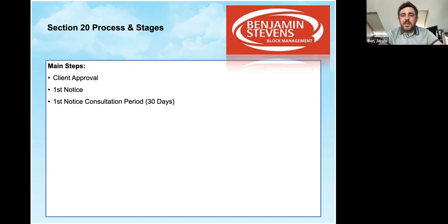So we don't feel at this time that if we extend it by a week on each notice period, you're then extending it by a couple of weeks, and you're starting to lose sight of the process. So upon ending of the consultation period, this is really where you should start to get tenders. And I know with certain projects, you might want to get an initial flavour of what something might cost for the client, which then starts the conversation about starting the project.